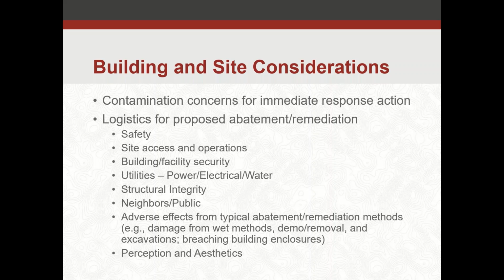Another scenario is specific contaminant materials. Sometimes you have an incidental disturbance condition in an area that people are accessing routinely or will need to access routinely. You can't really wait to clean up something like that. You might want to get that done ahead of time, get it out of the way, and then people can continue to work in there until that project goes to construction. A lot of different logistics when you're looking at building and site considerations.